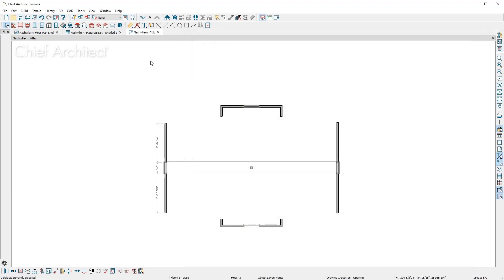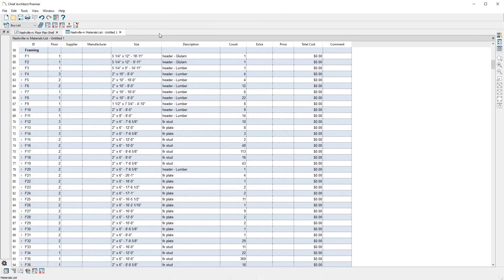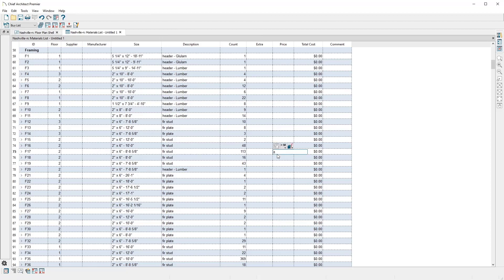Using a master list with prices, you can set up pricing for items like concrete and framing to make estimating costs for commodity items more efficient. For this standard 9-foot stud, I'll enter the price of $8 per unit. Notice the total column updates. I can add this price in my master list for future use.